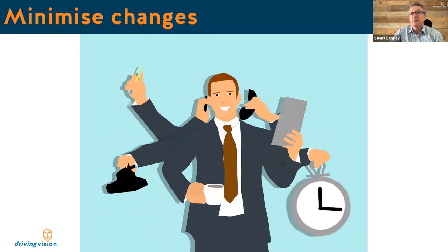So this is why it's crucial to include trades and subcontractors in the early stages of a project and its development. When stakeholders include trades and subcontractors, they get the professional opinions of the doers. Trades and subcontractors can tell if a design is constructible. Knowing the constructability of a project in the beginning will prevent change orders and late stage changes. Stakeholders must also agree to a stop date, a date by which all non-essential, non-emergency changes should be completed.